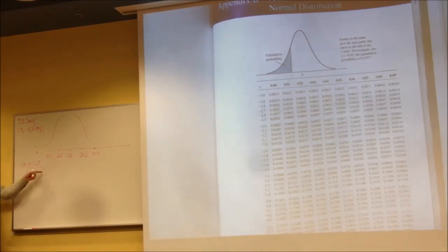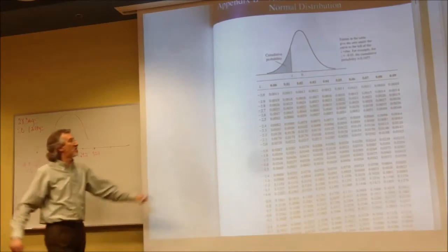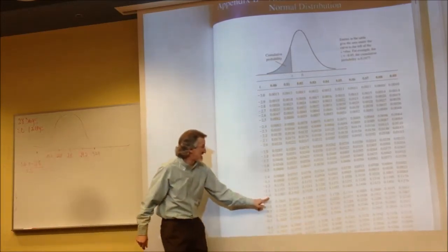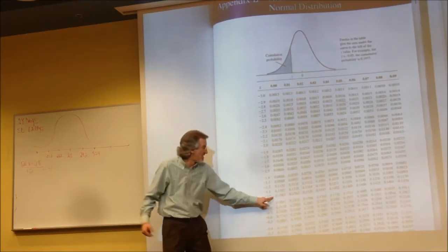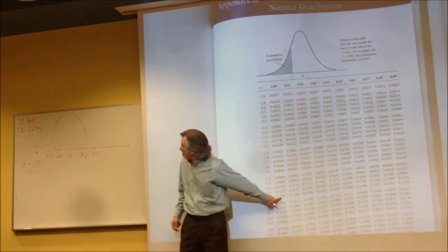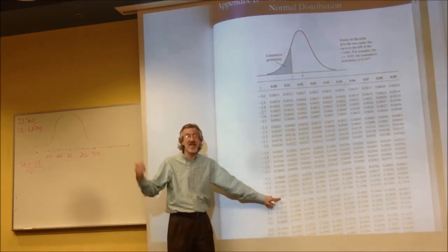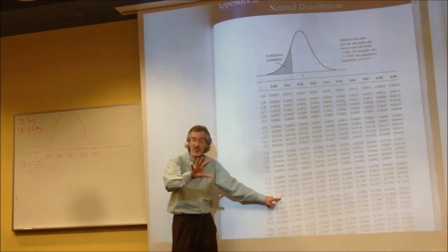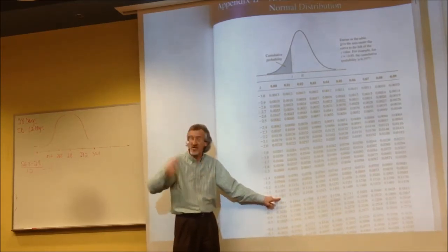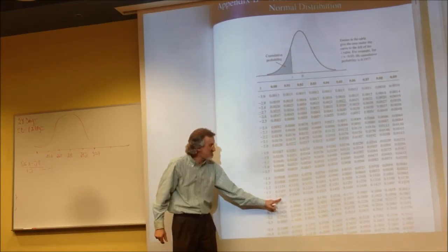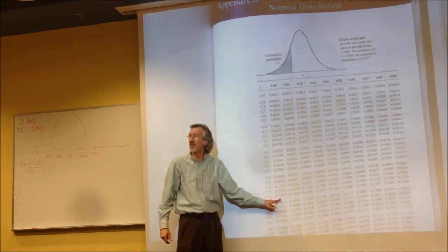And so, I look up now the -1 on my chart, 1.0, because it's 1 on the nose. The probability of the time being 26.8 days or less when the expected time's 28 days with 1.2 days standard deviation is about 15.87% chance.